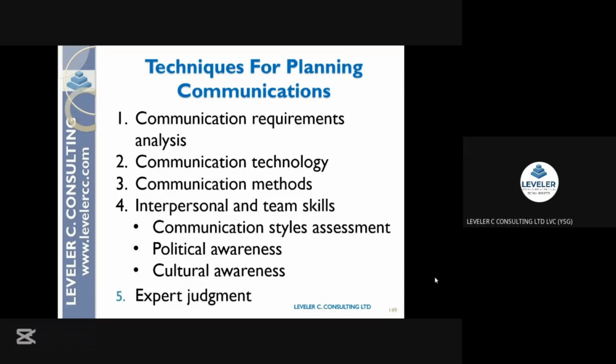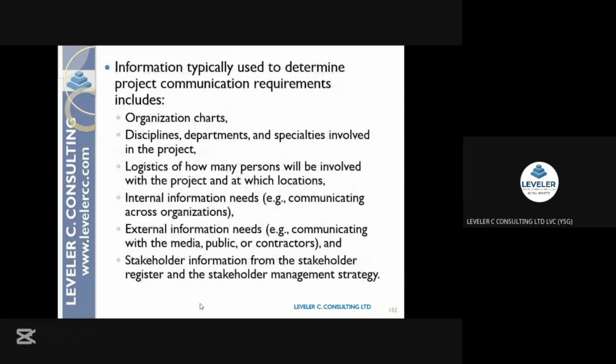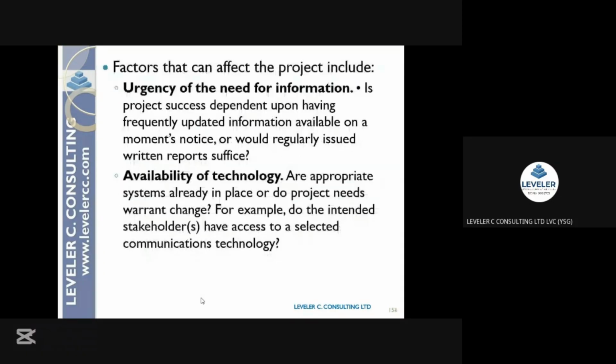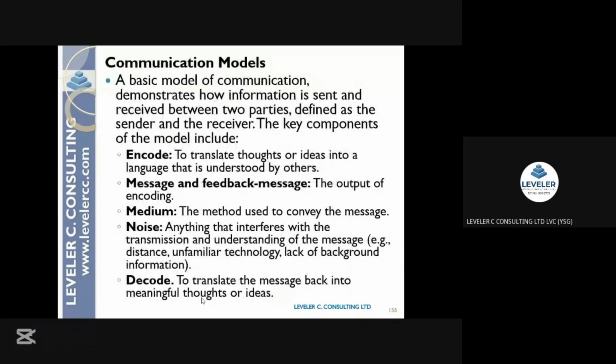Then, of course, expert judgment. These are the mediums that will help you to manage your communication. Very, very important. And we have said there are several ways of communication. In a project where we have 10 stakeholders, there are 45 potential communication channels. When you do that math, you will see it. That's how you go about planning your communication.